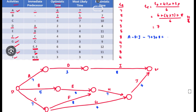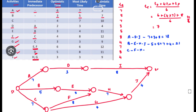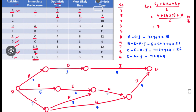Path A–D–I: 7 + 3 + 8 = 18. Path B–E–H–J: 5 + 5 + 7 + 4 = 21. Path C–F–H–J: 7 + 8 + 7 + 4 = 26. Path C–G–J: 7 + 4 + 4 = 15.